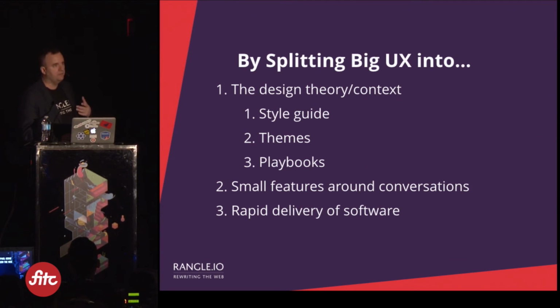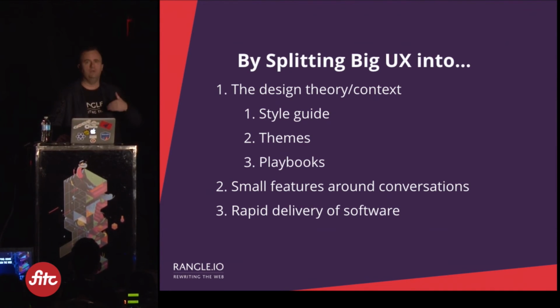So one of the big fundamental premises and requirements of a really effective Agile team, and the one that gets dropped the most often, is the team has to be able to solve all its own problems. So if you have a team of 6 people, and you have to go to the design group to get the design work done, and you've got to go to the back-end API team to get the API work done, and then you've got to go to QA to get the QA work done. You've got so many roadblocks. Now, they could possibly be fixed.